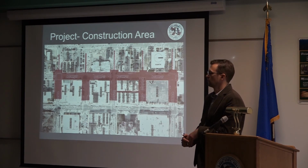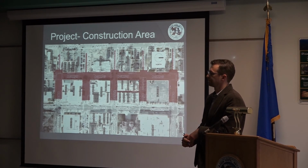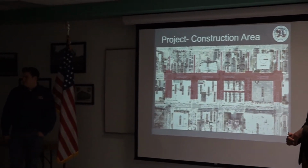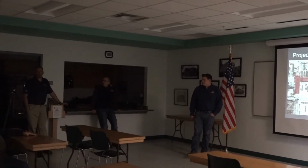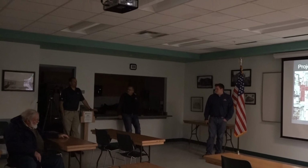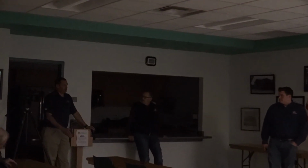The difficult part with that is it's not building widgets. Every day we come into situations we didn't anticipate and didn't expect. So if we said on June 21st we're going to be in front of this business doing this operation, and we said that 3 to 4 weeks in advance, we'd be lying to you. I'd love to be able to give you that level of detail, but it would just straight up be a lie. One thing Q&D will do is commit to an end date, and we will commit to communicating with